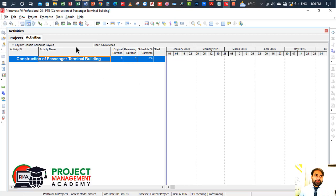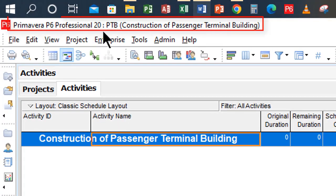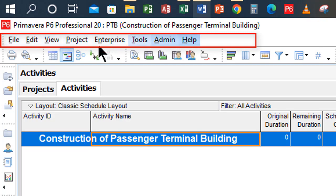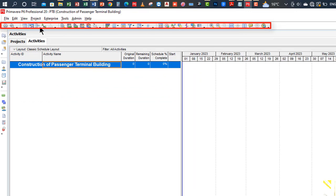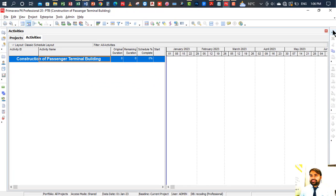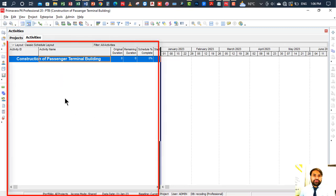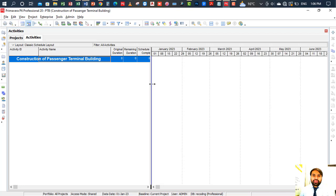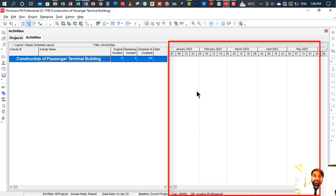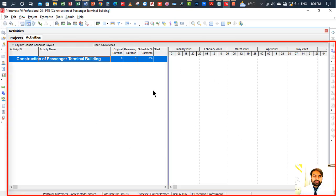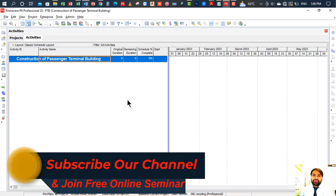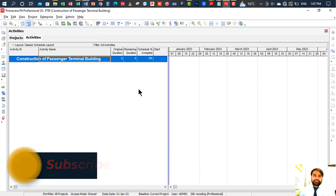Let me give a brief introduction to this interface. The top row showing 'Primavera P6 Professional 20 — Construction of Passenger Terminal Building' is the title bar, followed by the main menu bar, the standard toolbar, the left vertical toolbar, and the right vertical toolbar. The left window is called the Activity Table window, and the right window is called the Bar Chart window. Together they form the Gantt chart. That's how you create a new project file in Primavera P6 — please subscribe for upcoming videos. Thank you!